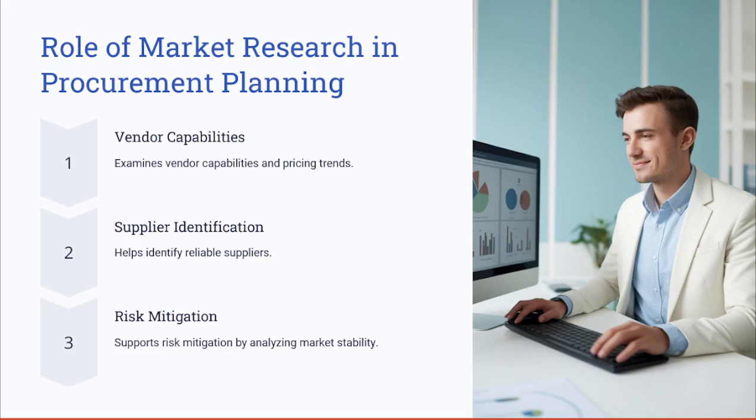Additionally, market research helps in anticipating risks related to supplier stability, such as financial situation and financial statements, cost fluctuation, and geopolitical issues that may impact the procurement decisions.